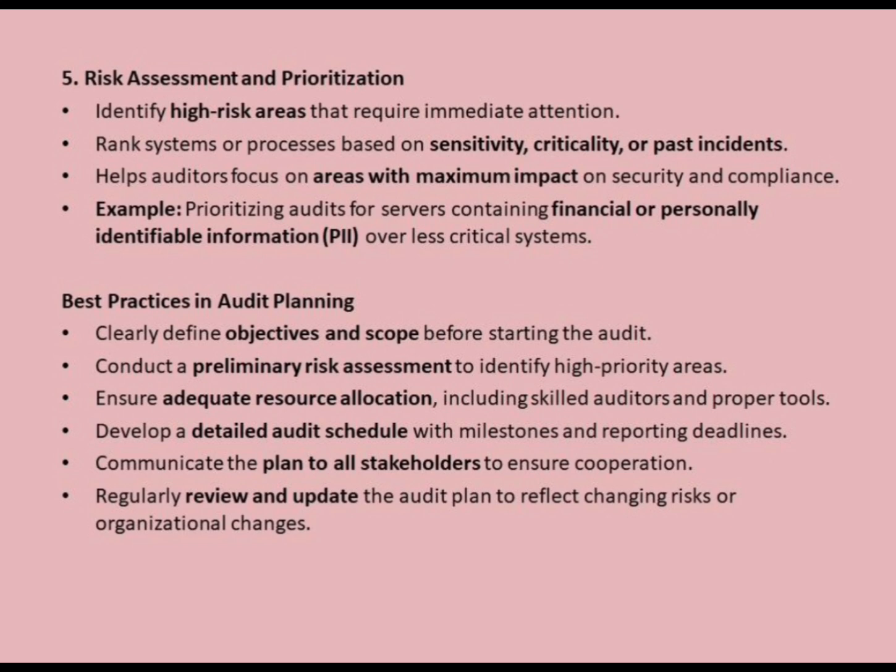Best practices in audit planning: define objectives and scope clearly. Ensure everyone knows what the audit aims to achieve and which systems, processes, or departments are included. Example: auditing only the HR department's payroll system rather than the entire organization. Preliminary risk assessment: identify high-priority areas before detailed auditing. Example: flagging servers with sensitive client data as high risk for early review.